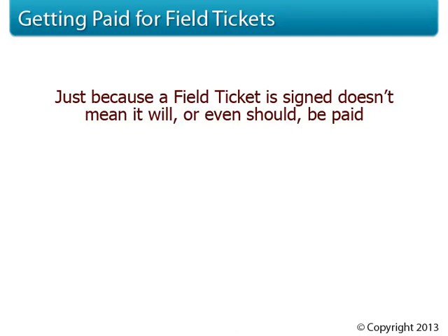Adding to this confusion is that field tags presented by subcontractors routinely contain standard pre-printed boilerplate language that states that a signature represents full and unconditional approval of all costs accrued for the work described. The reality subcontractors must understand is that change order issues can be quite complicated. As such, it's not a realistic expectation for a superintendent to perform the extensive research necessary to establish financial responsibility while they're hurriedly orchestrating the construction operation.